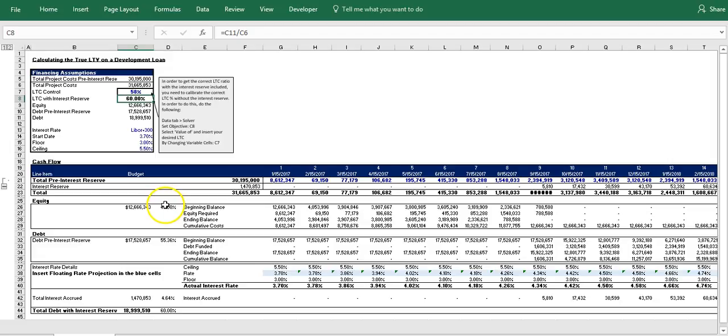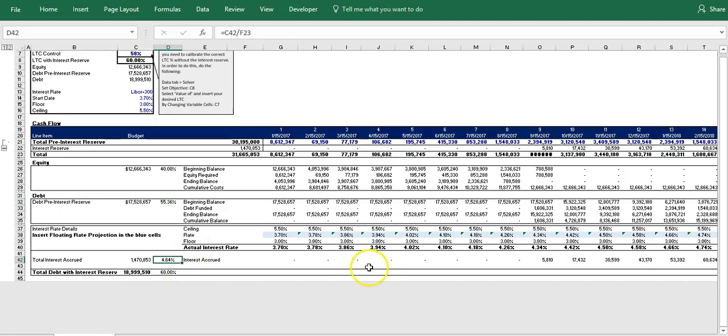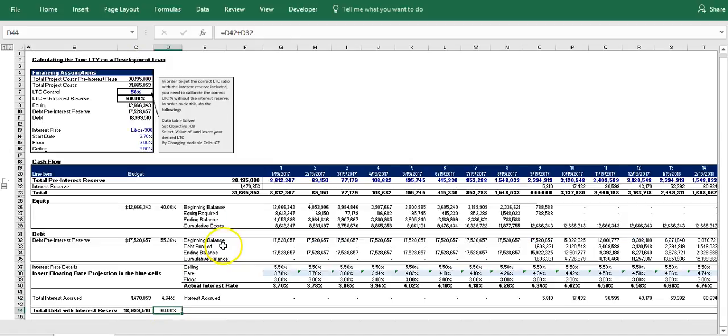And so now we have our loan to cost with the interest reserve set at 60%. You can see our equity is funding 40% and our debt is funding 55.36% plus 4.64% equals 60%. And so that is how you solve for this problem to be able to calculate for an accurate loan to cost ratio. And I hope you enjoyed this video and I will see everyone next time. Thanks.